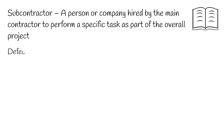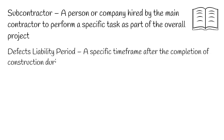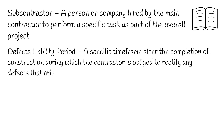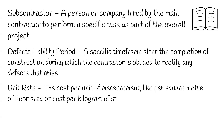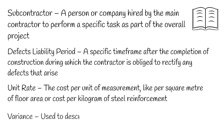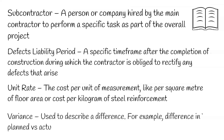Term 19. Defects Liability Period — a specific time frame after the completion of construction during which the contractor is obliged to rectify any defects that arise. Term 20. Unit Rate — the cost per unit of measurement, like per square metre of floor area or cost per kilogram of steel reinforcement. Term 21. Variance — used to describe a difference; for example, difference in planned versus actual cost, or planned versus actual completion.